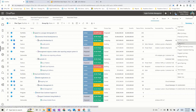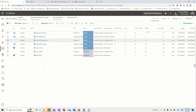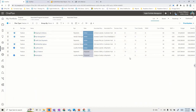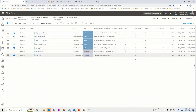I could also look at a prioritization view. In that prioritization view, I might be looking at weighted shortest job first calculations. Over here are the values put into different areas of business value, risk, time criticality, cost of delay, et cetera, that are contributing to that score.